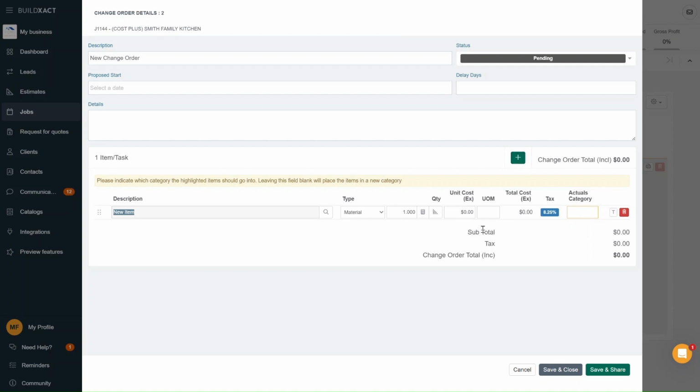The other difference here is when you add a line item, if you're looking closely, you'll notice there's no markup box. That's again due to the nature of how we process invoices for cost plus work. The client should understand that. It's the raw cost plus whatever, 15, 20%, whatever you've agreed to. And because of that, we're showing them just the raw cost when you do a cost plus change order. And it only gets that extra markup percentage when it hits the invoicing stage.